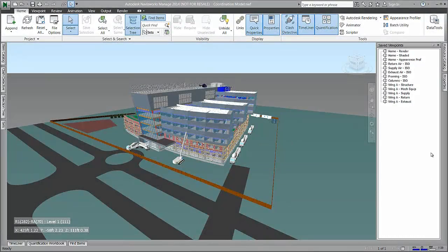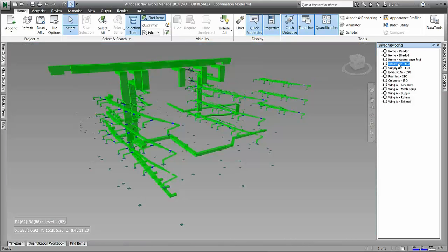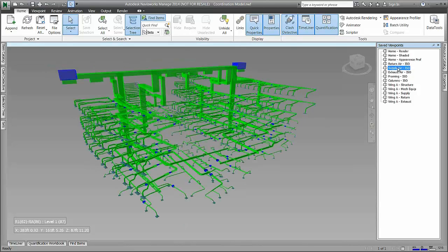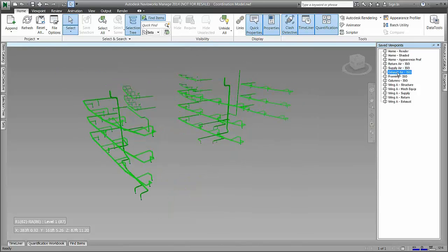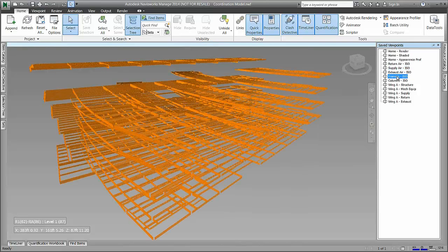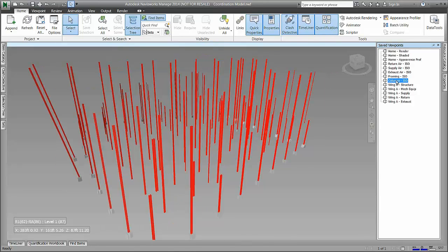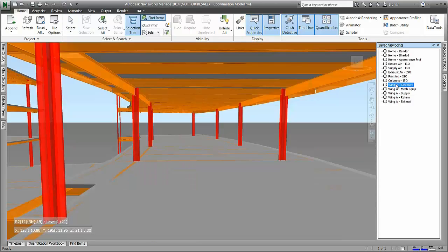Undertaking pre-construction coordination across all trades offers the best opportunity to understand constructability before work begins in the field, and to help avoid preventable RFIs and change orders that can risk project schedules and budget. Constructability models from each trade can be integrated into a single multidiscipline project model, regardless of authoring application. This is a key step to being able to coordinate these disciplines.